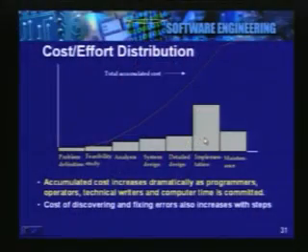Now, if it is not detected at the review phase of the analysis, it would be carried over into design, detailed design and implementation, and it is possible that we discover that mistake during the operational part of the software, when the users have started using the software. Now, in order to make the correction, we will have to undo all the code, the design, etc., and go back right up to the analysis phase, identify what was missed out or what was wrongly understood, and carry out the design and implementation and testing process again.